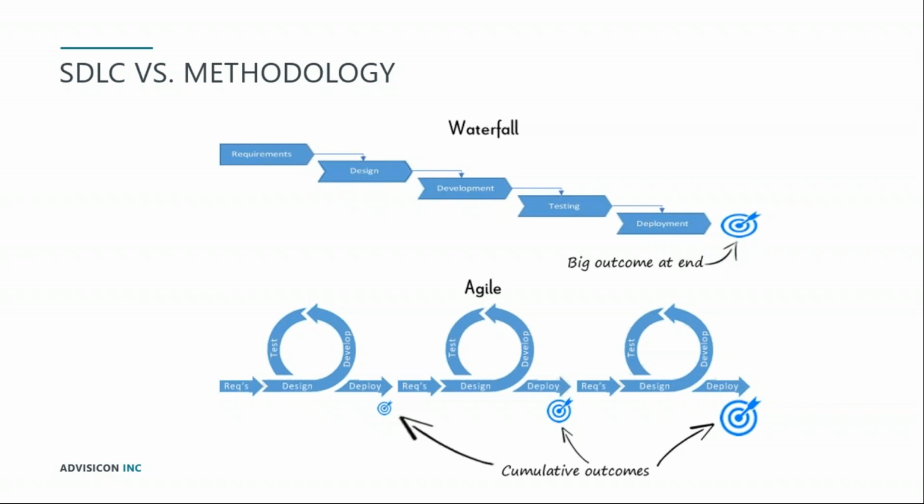So with waterfall, for example, all requirements will go through these phases together from start to finish. With Agile, it's small iterations repeated over and over until you have completed all requirements. But in both cases, they each utilize these same phases. Now, you may have different ones. It doesn't have to be requirements, design, develop. Some do initiation, research, planning. Either way, you perform that same process, but with Agile, you're in an iteration instead of one big bang.